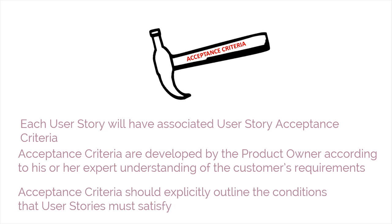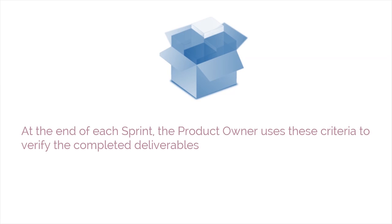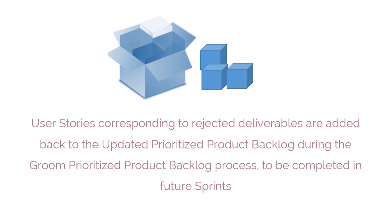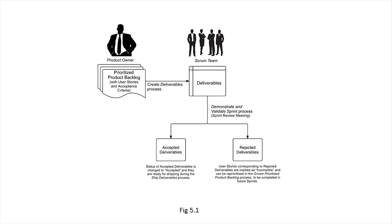Acceptance criteria provide the objectivity required for the user story to be considered as done or not done during the sprint review meeting. These also provide clarity to the team on what is expected of a user story by removing ambiguity from requirements and aligning expectations. At the end of every sprint, the product owner will use the acceptance criteria to verify the completed deliverables. If the deliverables meet the specified criteria, then the associated user stories are considered done. User stories of rejected deliverables are added back to the updated prioritized product backlog during the grooming prioritized product backlog process to be completed in future sprints. This is summarized by Figure 5-1 presented here.